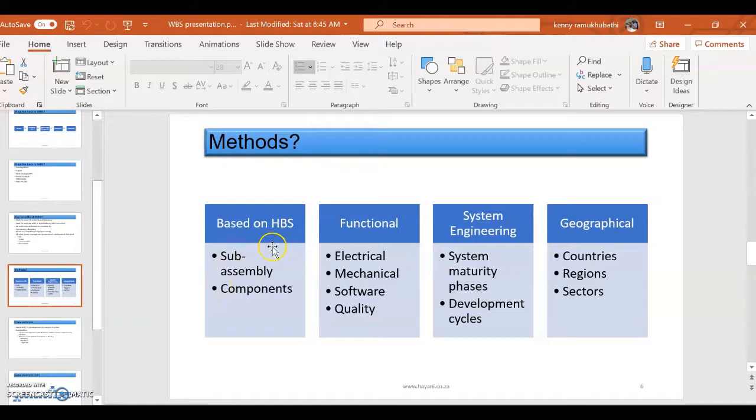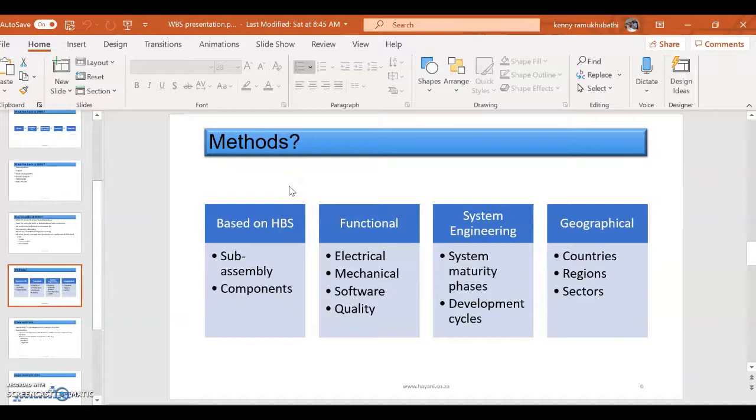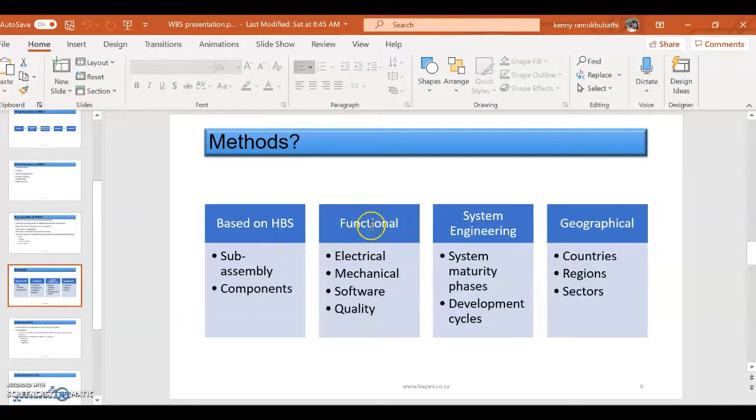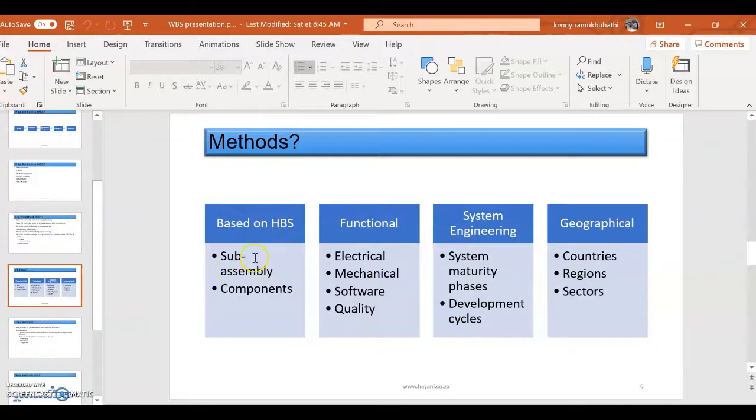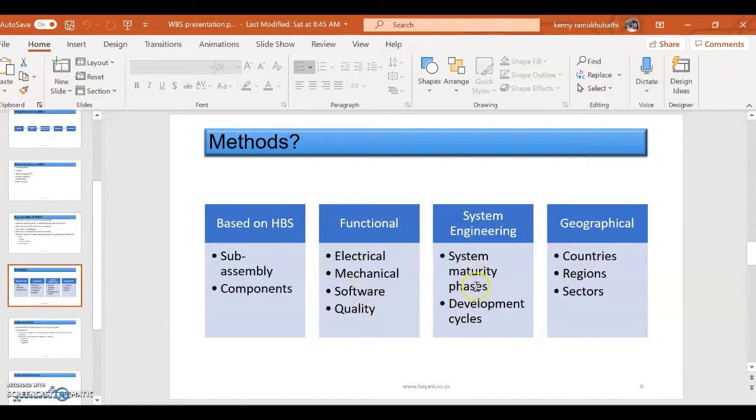Let me go quickly - methods. So these are some of the examples I had to put for you so that you can see how you actually can do Work Breakdown Structure. So the popular one is the hardware breakdown structure. Depending on the environment and the type of product that you're producing, you can actually also do it functional, system engineering, geographical, and then hardware breakdown structure is sub-assemblies. Like in a bicycle you will have the wheels, you have the frame, you've got the steering system, and then there's components as well. On the functional, you are going to go to functional systems which is electrical, software, and then system maturity, development cycles. But I will make examples of this.